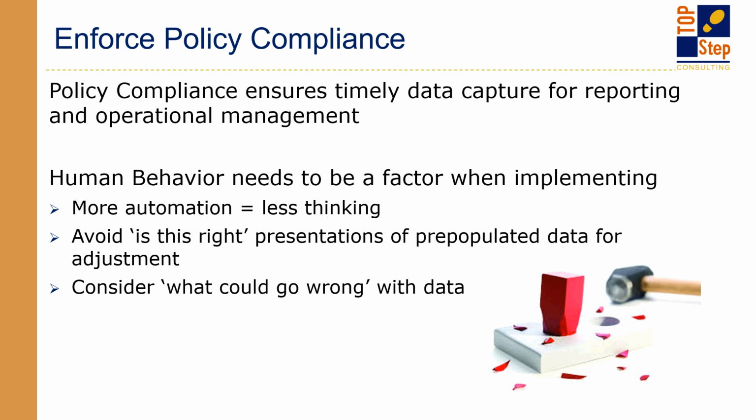Compliancy. If you don't have your time cards in, how can you report on your business efficiency, on your operations team, on your estimates versus actuals? How can you make sure that things are actually happening the way that they should be? You need to make sure that your budgets are accurate. So if you have an additional SOW for your change order, are you adjusting your budget? Are you creating a new project? How are you keeping track of that? Are you using hierarchy projects? You want to make sure that everything is in the system. It is audited, because everybody knows that the auditor comes around once a year, but you should be keeping your data and your compliancy in place.